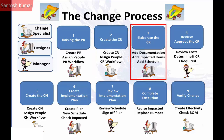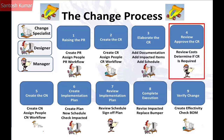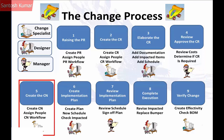Then the change specialist initiates the change request workflow. The designer adds additional information to the change request, such as other impacted parts and assemblies and a scheduled plan. The Change Management Board reviews the request and determines if the change should proceed. If it does, the change notice will be produced. The change specialist is tasked to produce the change notice, assign people to create the implementation plan, and assign the final review board.